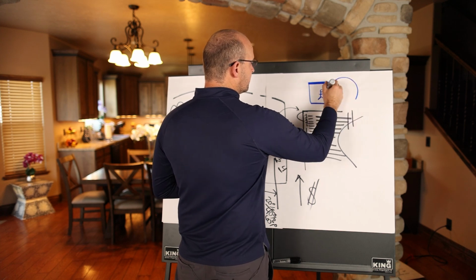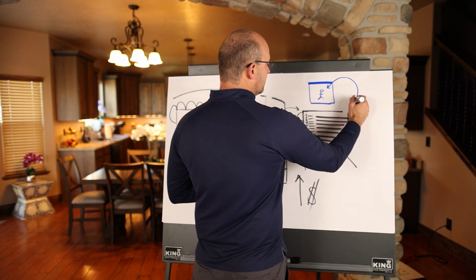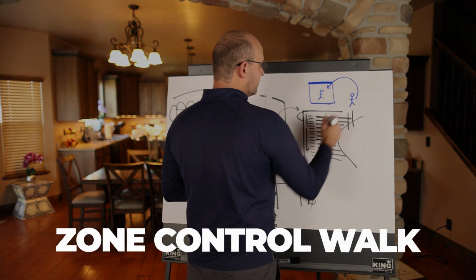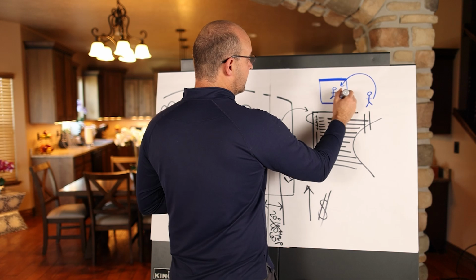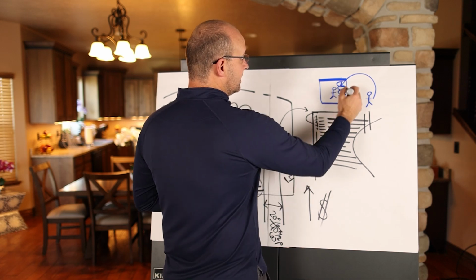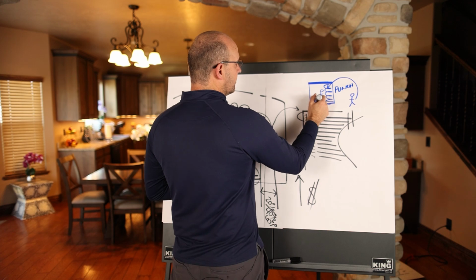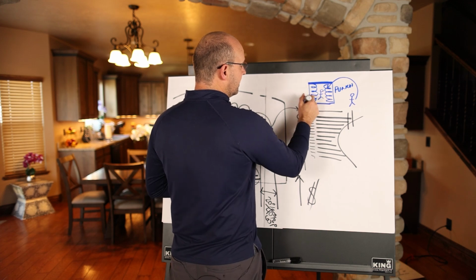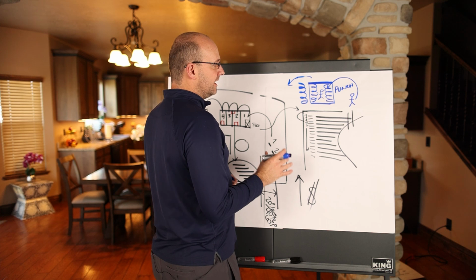The general contractor at the handoffs, where you're switching from zone to zone, needs to do what's called a zone control walk. You look with the foreman at the units that have been completed and punch that out as you go. Then you work with the foreman to prepare the area ahead, maybe even the zone ahead, so that work can be made ready out ahead.